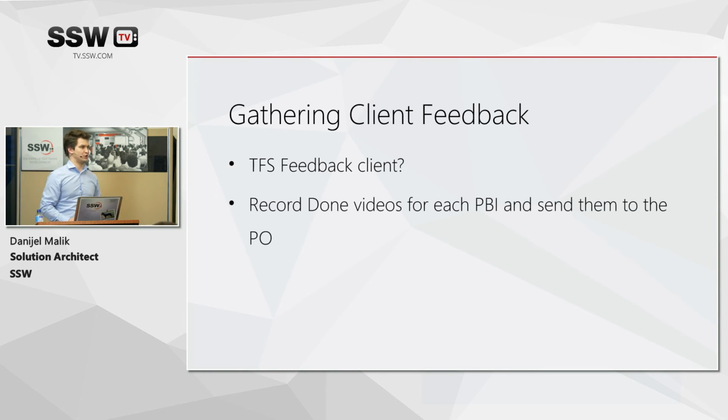The other one, what we usually do, and Shigemi will be able to tell you a bit more about it. He's doing that. I think he's our best video guy. So we record done videos for each PBI and we send them to the product owner. And then the product owner can check the video immediately. So if it's a UI change, we'll probably do just a screenshot. But if it's some logic in the back, we'll record the video and he's going to see it. Okay, this is what is happening, it's pretty good.